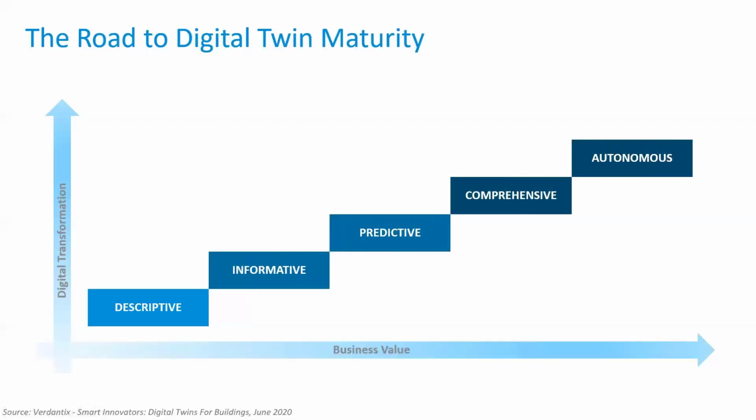We've talked a lot about this maturity model around digital twins, starting with this notion of a descriptive twin, which is really an as-built representation of the asset spaces and systems in a facility. Doesn't need to contain LOD 500 models with every nut and bolt in the curtain wall, needs to contain all of those operational assets and an index to all of that information you need to operate a facility effectively.